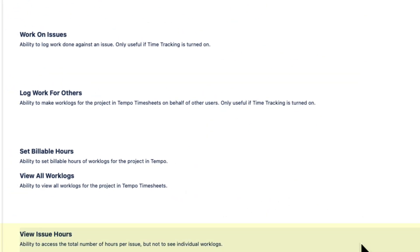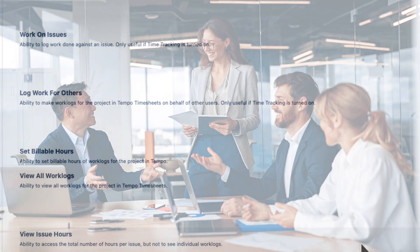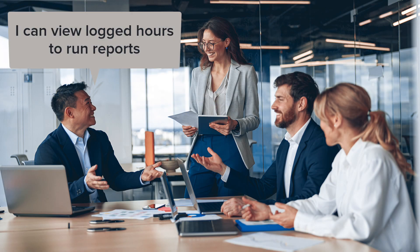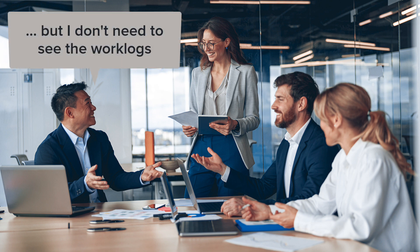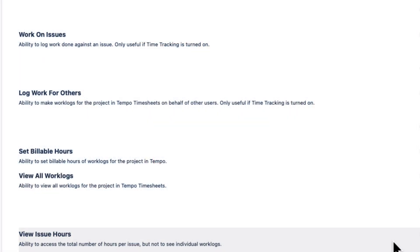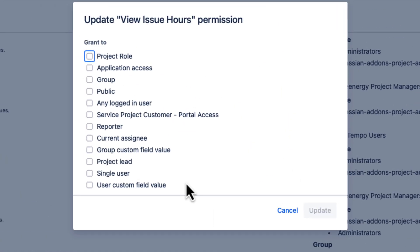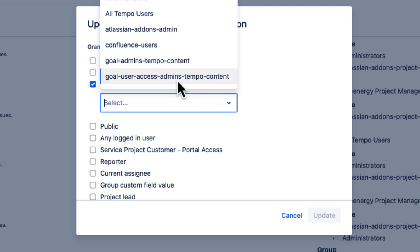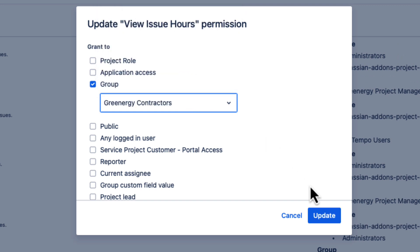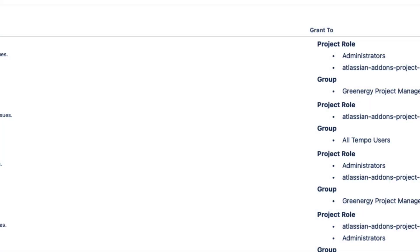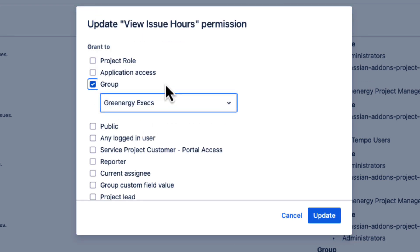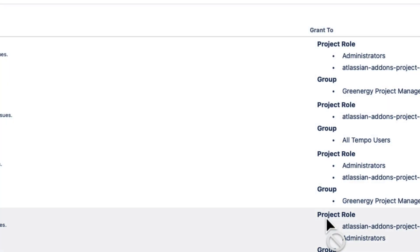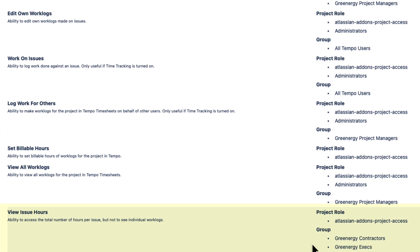Finally, I need to grant the View Issues Hours permission to external contractors and also to executives. This permission lets them view hours logged to JIRA issues to run reports and timesheets, but they can't, or don't need to, see the individual work logs of the users. I'll click Update, select Group, and grant this permission to the Greenergy Contractors Group. And then I'll click Update again and grant this permission to the Greenergy execs. I'll scroll down and now I see that these two groups have this permission.